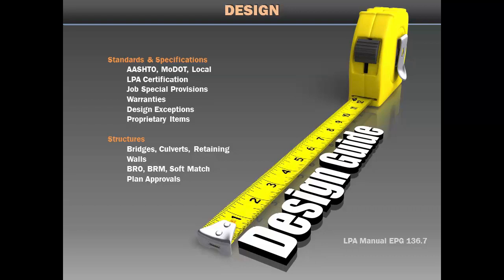Routine warranties or guarantees provided by a manufacturer are valid. For example, the industry standard warranty for a tree planting is typically 1 year. If construction is complete and you have accepted the job, the contractor would give the warranty to the LPA at final acceptance. The responsibility of the warranty belongs to the LPA from this point forward. Projects cannot be held open for an extended warranty period to defer the LPA's maintenance responsibility.